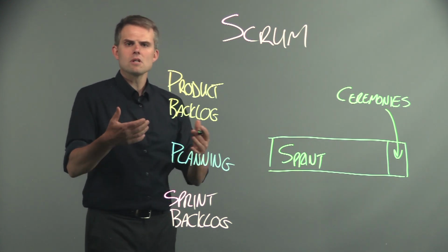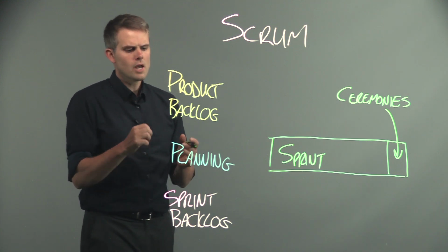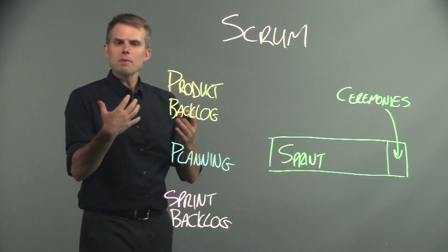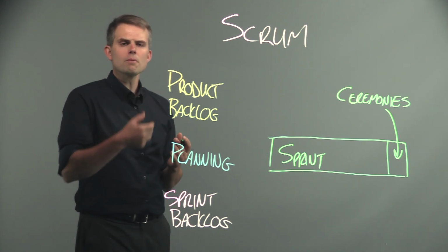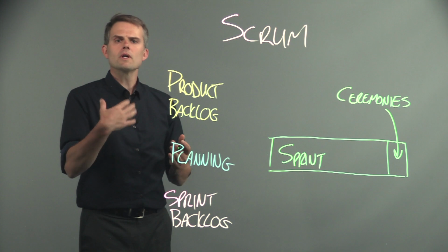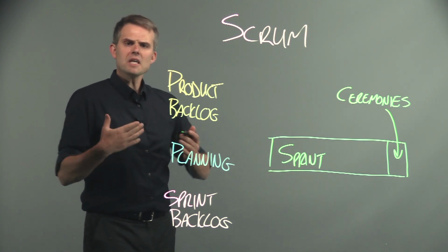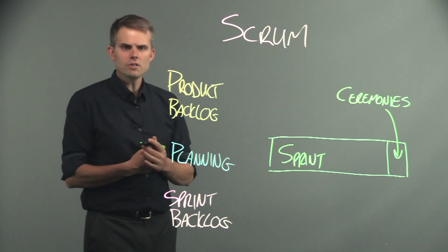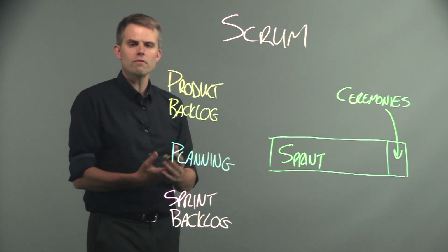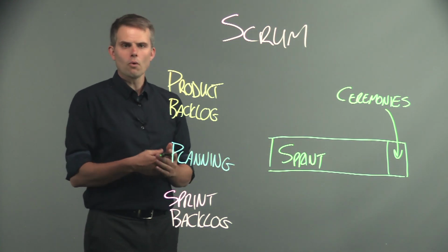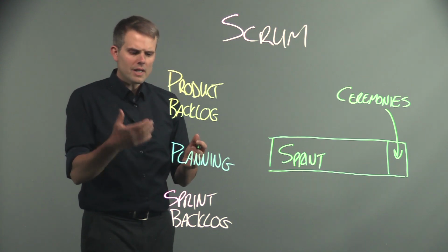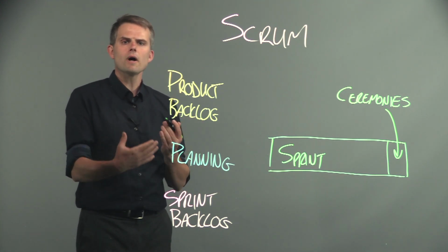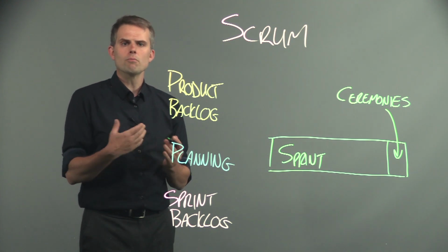So this planning process is an important step, right? We're going to be going through all of these issues. And this is going to be done in conjunction with the product owner because the product owner is going to have some notion, based on their own priorities, of which features in the product backlog are most important to them, right? Will give them the most value. But at the same time, the technical team is going to know, or they're going to talk about, how hard it is to actually deliver those features. Because if the product owner asks for a feature that will take more than 1 sprint, or they ask for too many features to deliver in 1 sprint, it's the team's role, and a crucial role, for them to push back and say that this is too much to be done and we need to find a happy medium that works for both stakeholders.